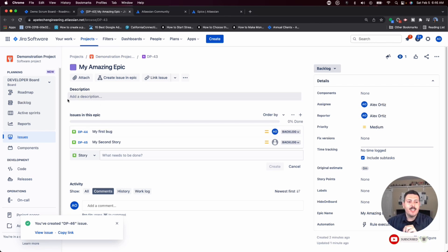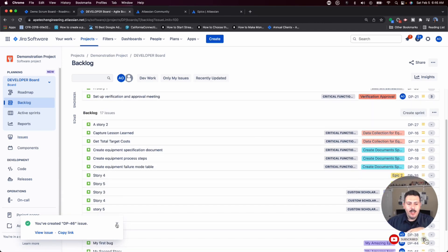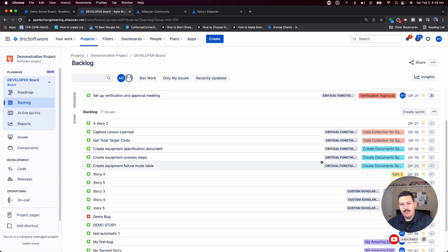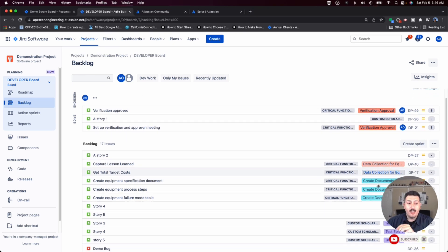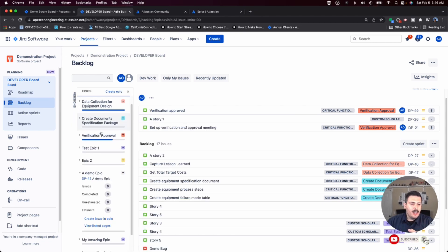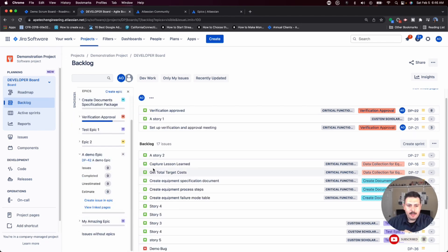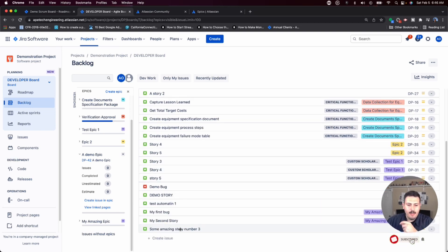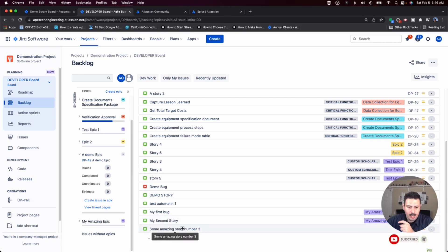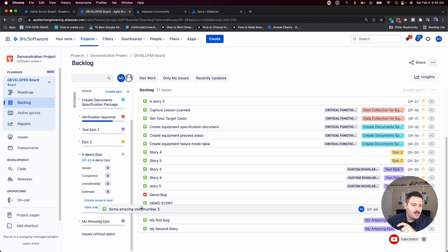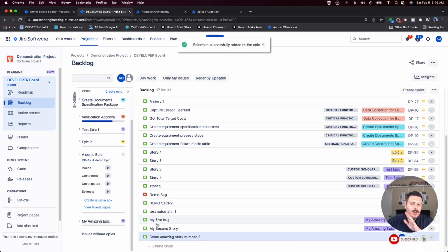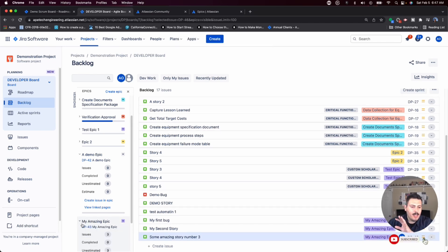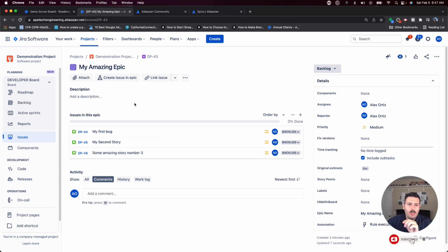One way is if you're in the backlog view, you'll notice that you have stories and there's colors on the side and those colors represent different things, but the epic is the colorful one. And so if I open up my epics pane and I scroll down, you'll see my amazing story is purple. And so I'm just going to grab that amazing story number three, you'll notice that it doesn't have any purple because it's not actually linked to any epic. So to link it, all I got to do is click and hold, drag it over to my amazing epic. You'll notice that the screen turns green here with the dotted green line, let go. And now my story is associated to that epic. So now if I open the epic up, you will see that third item in this epic. So that's the one way.